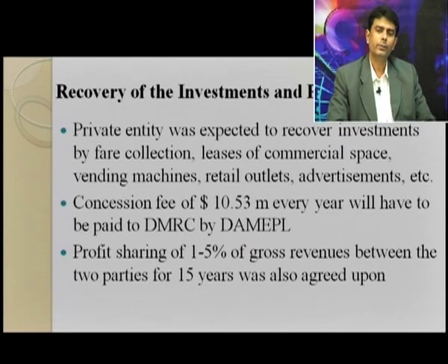Concession fee of $10.5 million every year will have to be paid to DMRC by DAMEPL. Profit sharing of 1 to 5% of the gross revenue between the two parties for 15 years was also agreed upon.